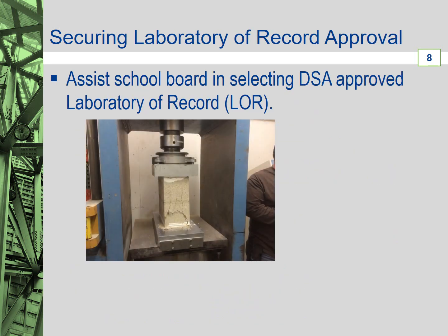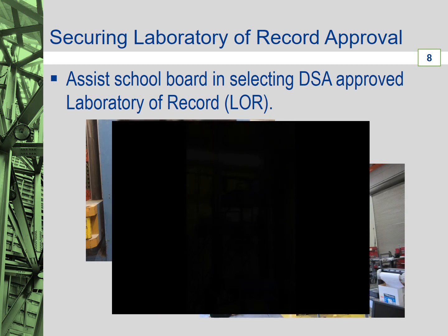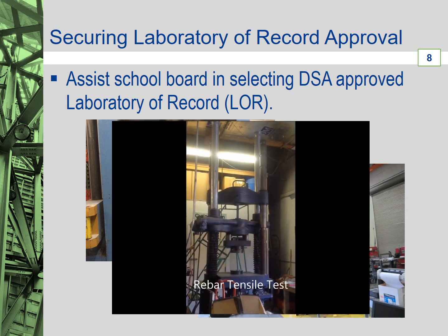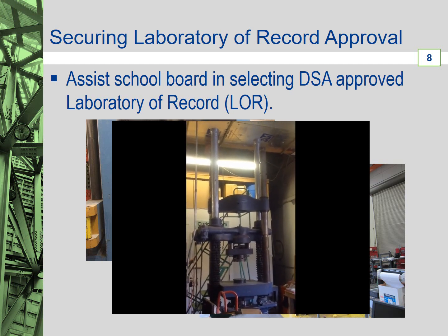The design professional must provide assistance to the school board in the selection of a laboratory of record acceptable to DSA through the Laboratory Evaluation and Acceptance Program to provide the required structural tests and special inspections for the project.